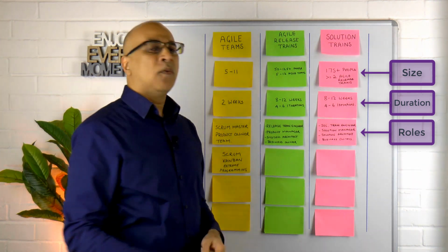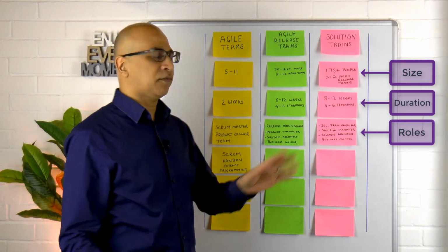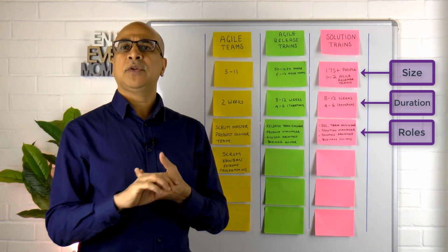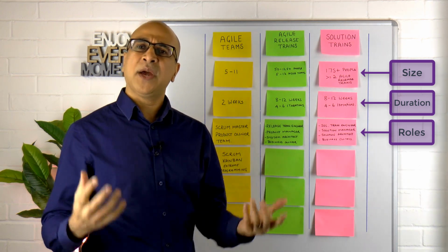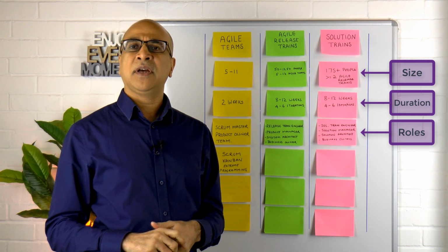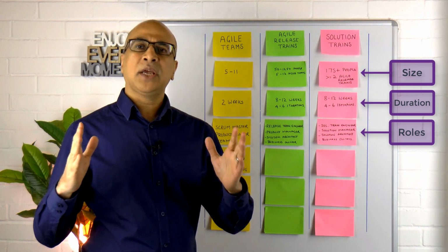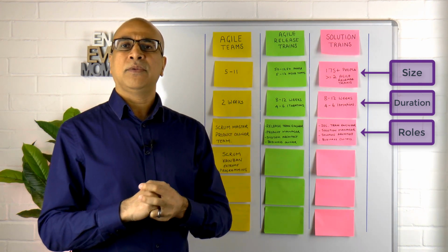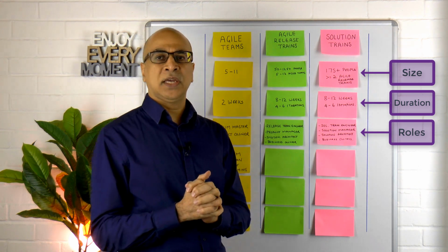Okay, now, what kind of methodologies will you typically find at each of these different constructs? At the team level, we could be using Scrum. So what is Scrum? Scrum is a lightweight agile framework that helps us to deliver, and we do planning at the beginning of that. We lock in what we're going to be delivering, and we deliver on that commitment over the next 2 weeks, right?